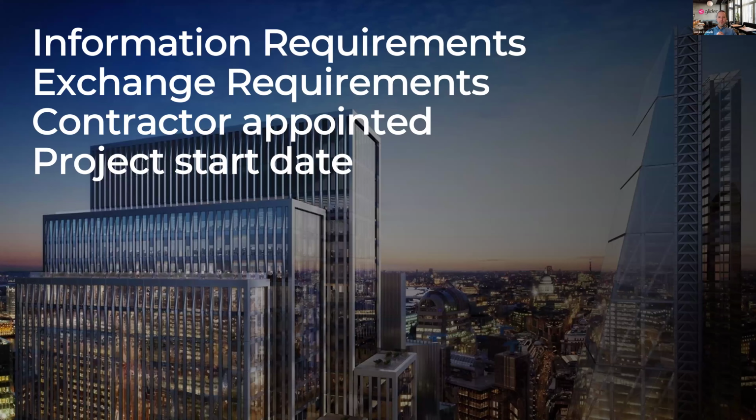So we're ready to build 40 Leadenhall. We've got the information requirements. I've got the exchange requirements. The contractor is appointed. That is Mace. They've been appointed to deliver the project. So naturally, they've inherited the responsibility of supplying the handover data. That includes asset data, 3D models, documents. Mace have appointed Glider to deliver the handover requirements using our managed service to corral the trades and validate the information that they were supplying against the requirements.